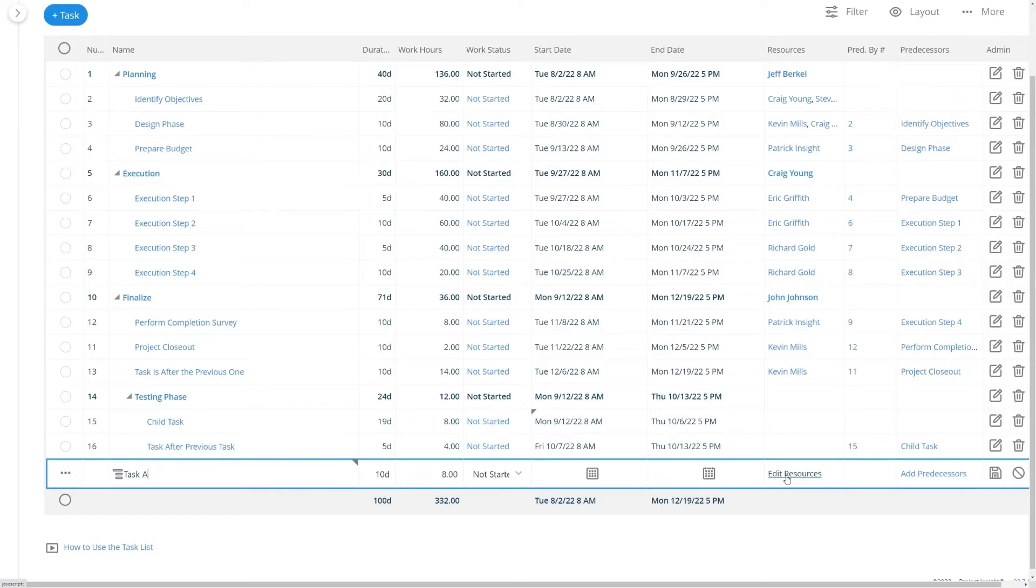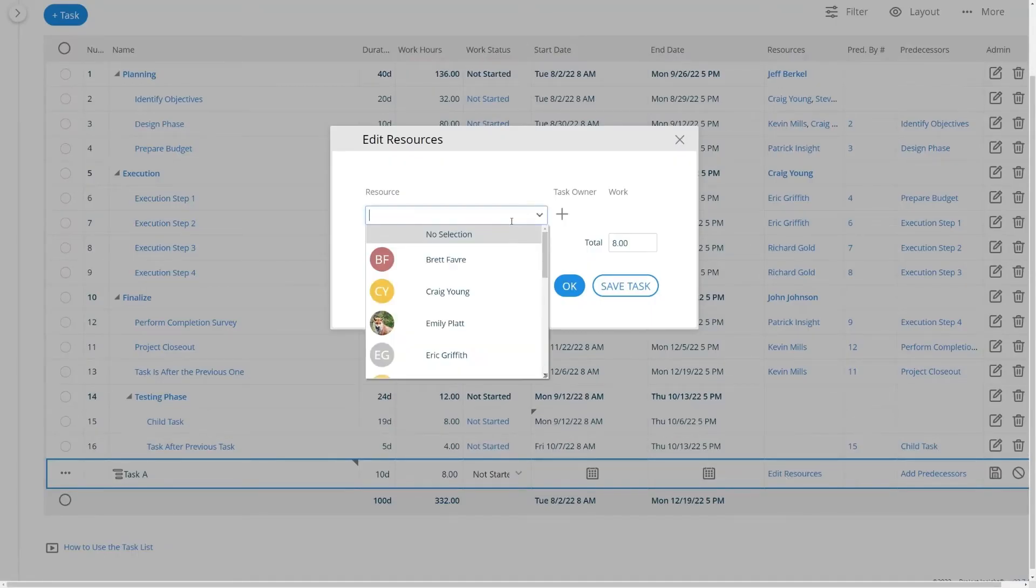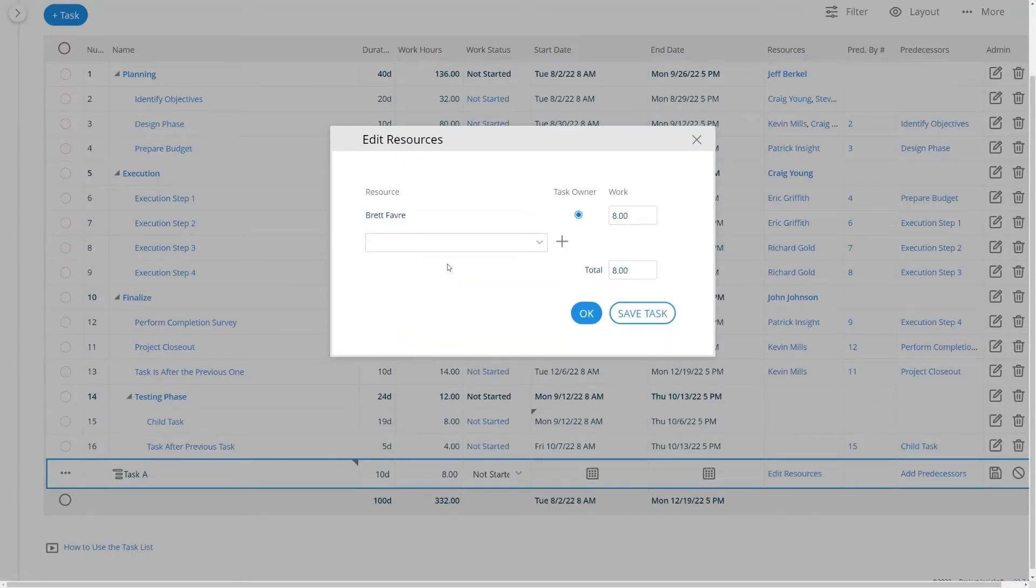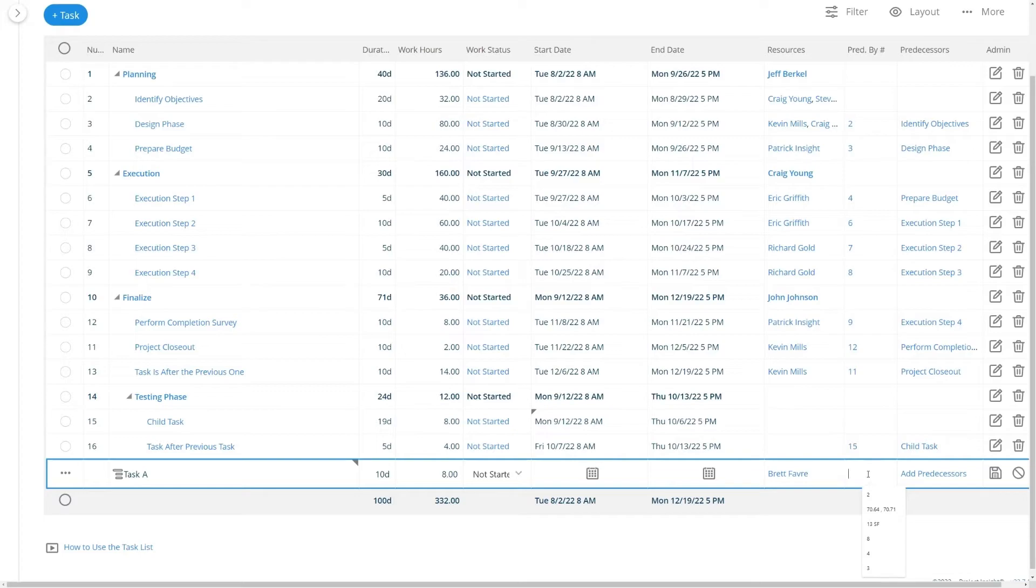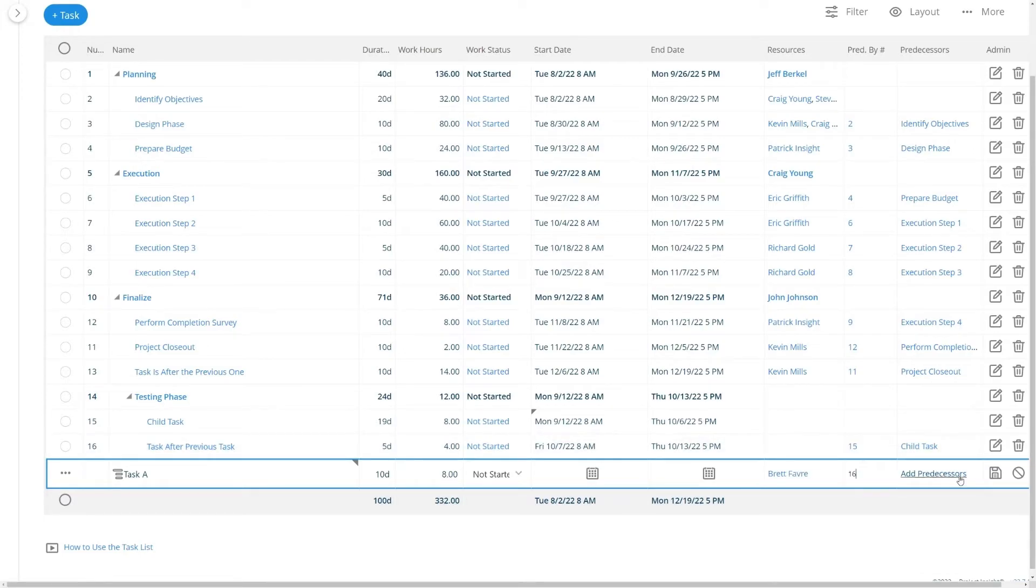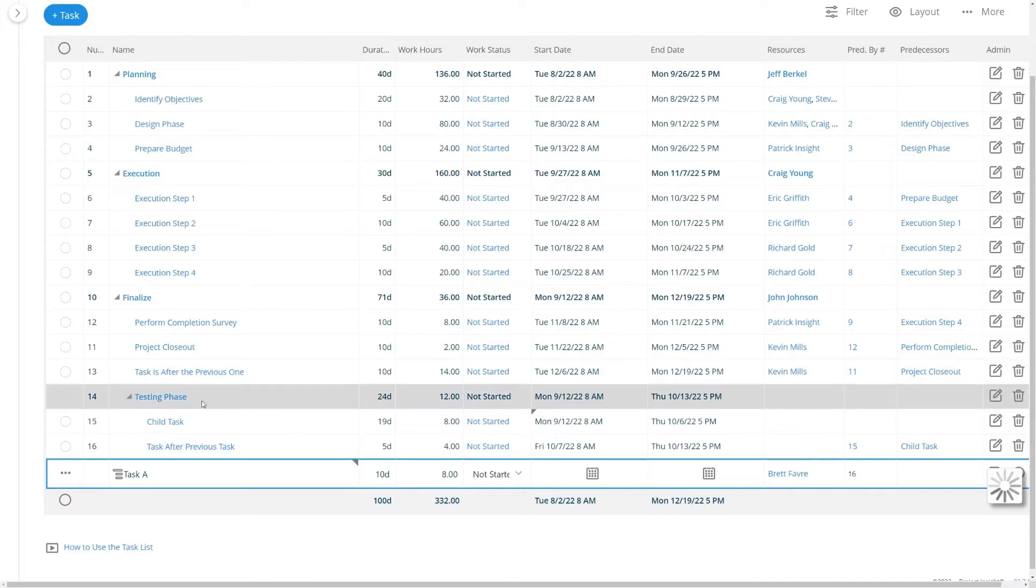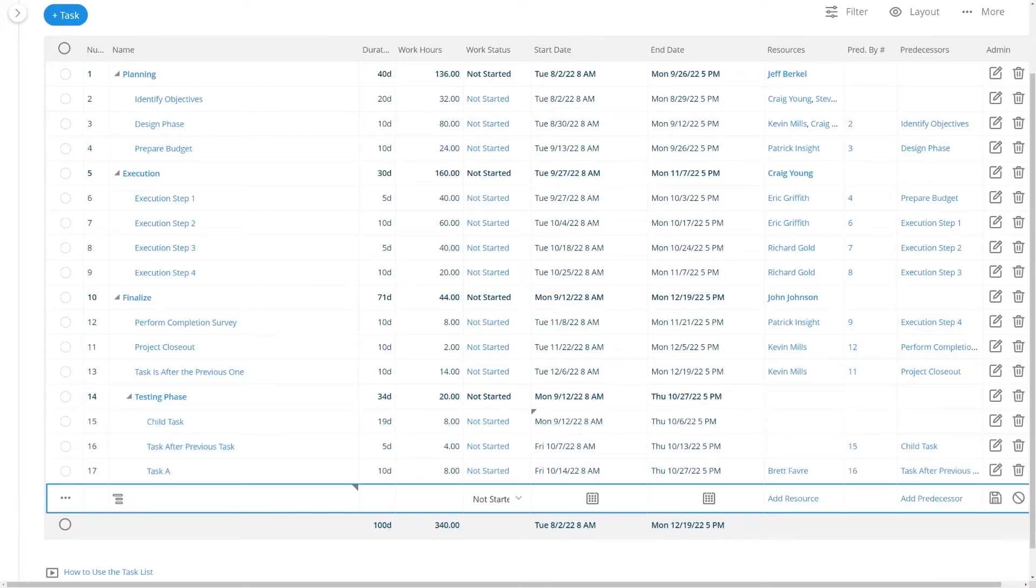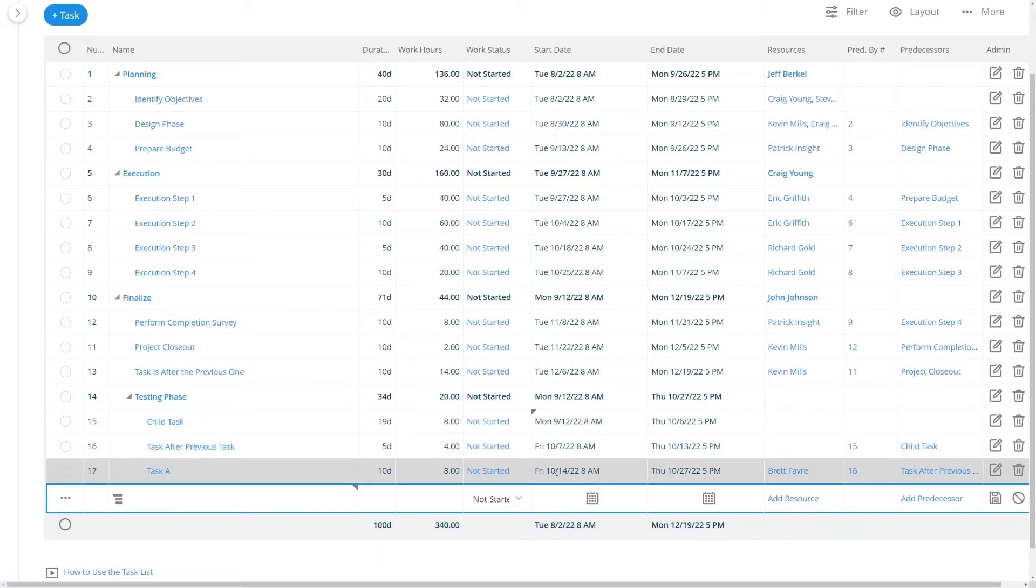When you want to assign the task you can choose to edit resources. I'll just assign this to Brett Favre, click OK. This one I also want to make a predecessor to the prior task 16. I can hit the save button or enter key and it will calculate now based on the prior task. Here I have task A. It will happen after the end of the previous task because it's a successor.